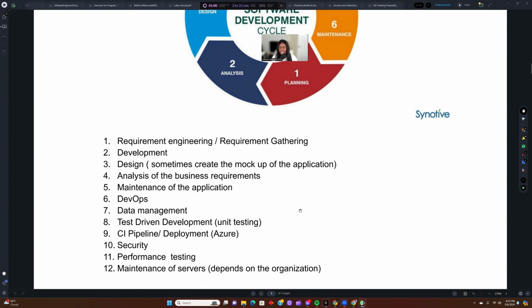The requirements gathering and engineering could take between 3 to 4 months, almost a whole quarter of the year. The reason it takes that long is because millions of dollars are being spent to build these apps. So we have to make sure that what they're asking for is exactly what they're looking for, and that it's actually documented. Because once it's documented, we can't really change it too much once we're deep into the project. Like, we're 6 months into development. At this point, we can't have someone come in and say, "Oh, I changed my mind. I want something different for the app." Boo. We've been developing for 6 months. You have to put a request in, or wait till we're done with the development, then we can add it as an enhancement.